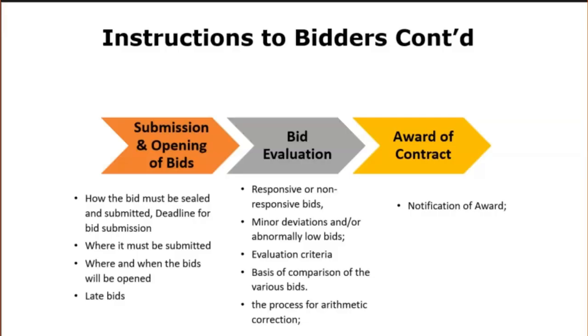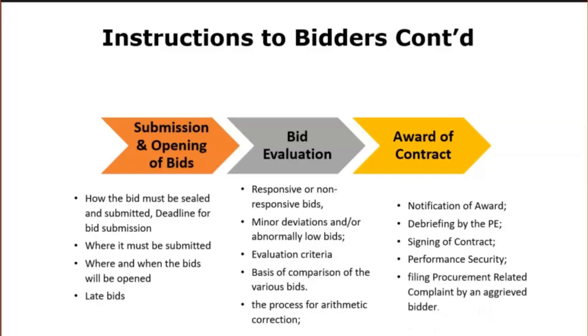the process for debriefing by the employer, the process for signing of contracts, the requirement for performance security, and the process for filing procurement related complaints by an aggrieved bidder.